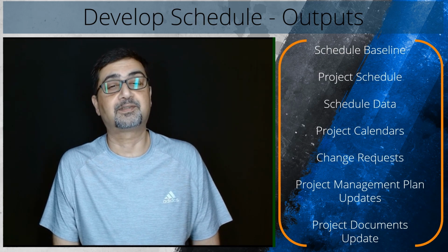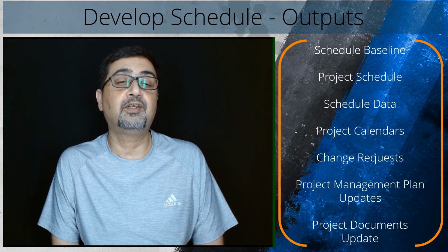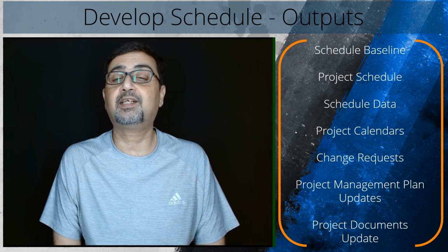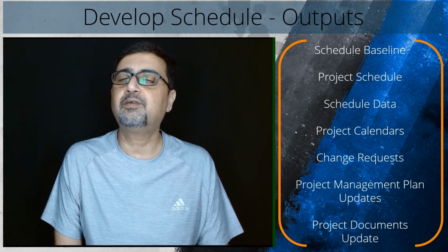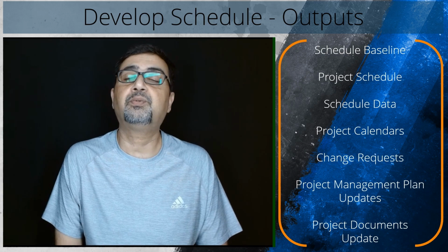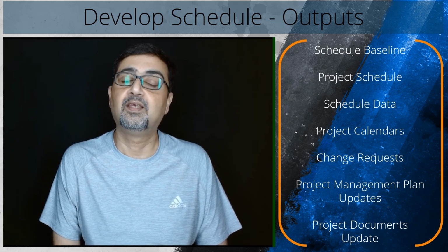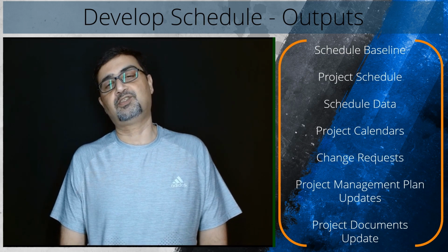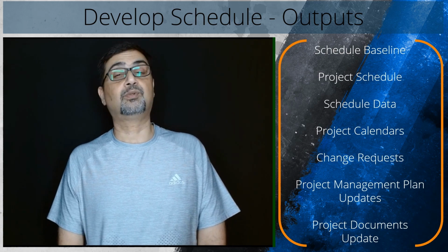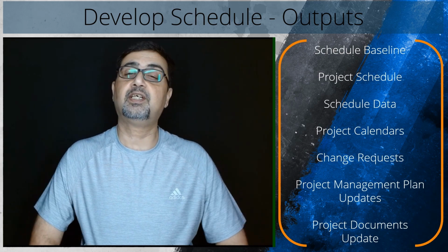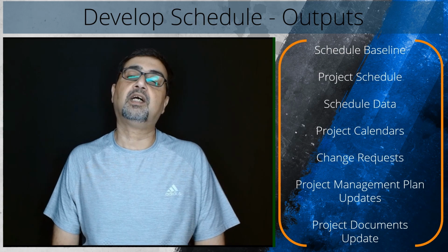Duration estimates. The number and availability of resources, along with the activity dependencies, can result in a change to the duration estimates. If the resource leveling analysis changes the resource requirements, then the duration estimates will likely be updated as well.